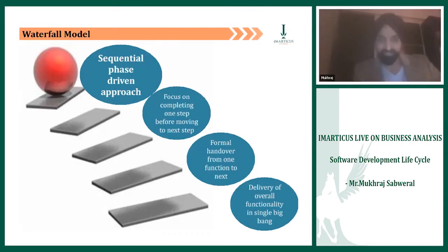What if, while Rajesh was building the requirements, at least the initial requirements could be dropped into the design cycle so they could be quickly designed, then dropped into the coding cycle, completely coded, and dropped into the testing cycle? While this is happening, Rajesh is bringing in the next set of requirements from his stakeholders. So what did we do? We made sure that we do not stand at the gate of the house and refuse to enter till we are completely done with phase 1. We enter the gate with some things so that we can hand it over to the next person.